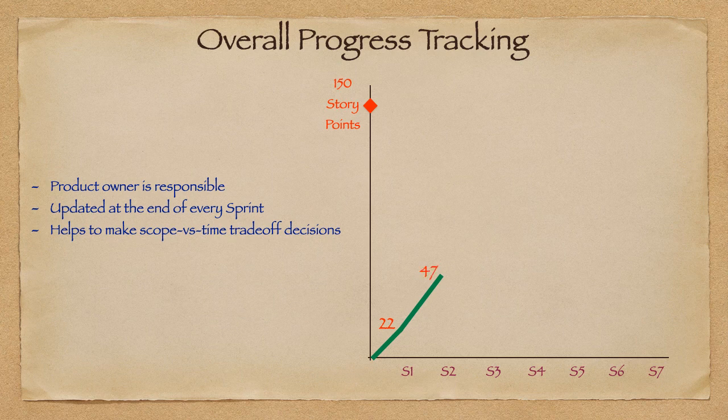And let's say in the sprint 2 review we have received some feedback, and the high level estimate for that feedback is, let's say for example, 15 points. Now the overall work has increased to 165, from the 150 we started with, based on the feedback received.